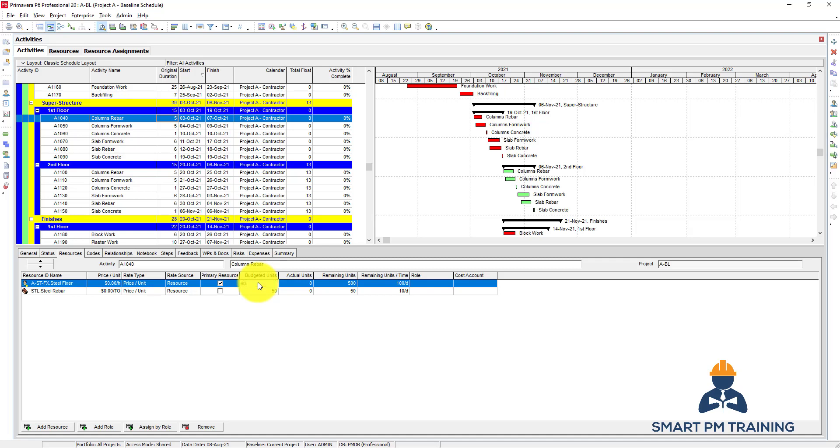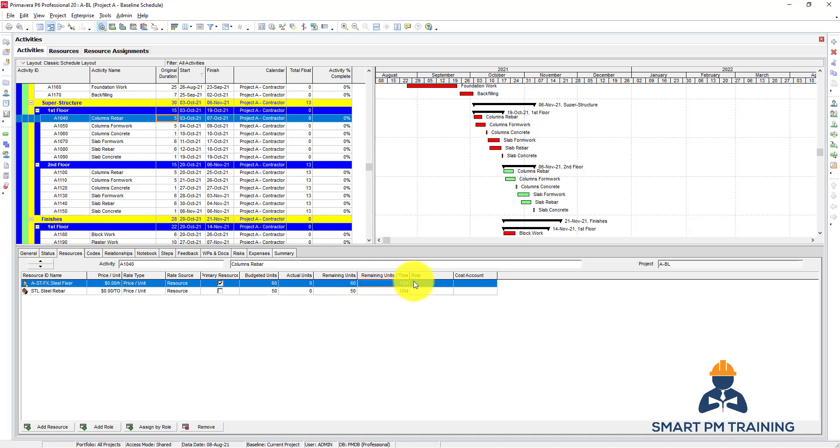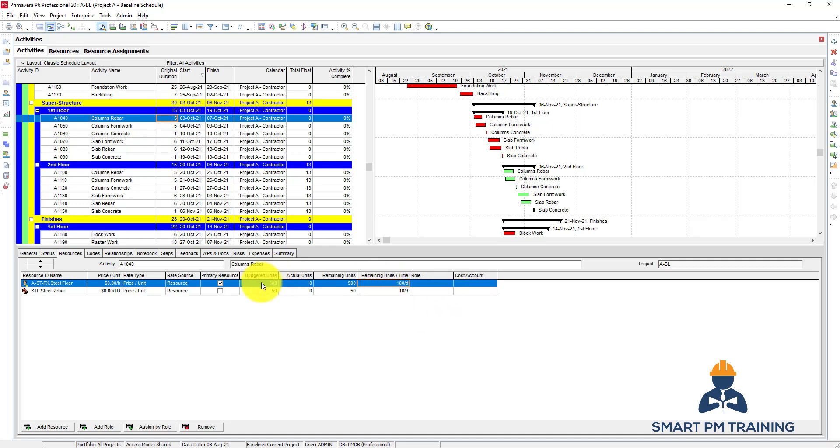I can also keep it from the remaining units per time, because it's a baseline, so the remaining units is actually the planned work. If I want to assign 10 labors per day, working for 10 hours per day, it's 100 labor hours. So here, remaining units per time, the number per day, 100 per day. Once I put 100 per day, it will multiply by how many days this activity has - so five days times 100, so overall hours 500. You can calculate it either way - separately and just type the overall budgeted units, or you can calculate the daily units.